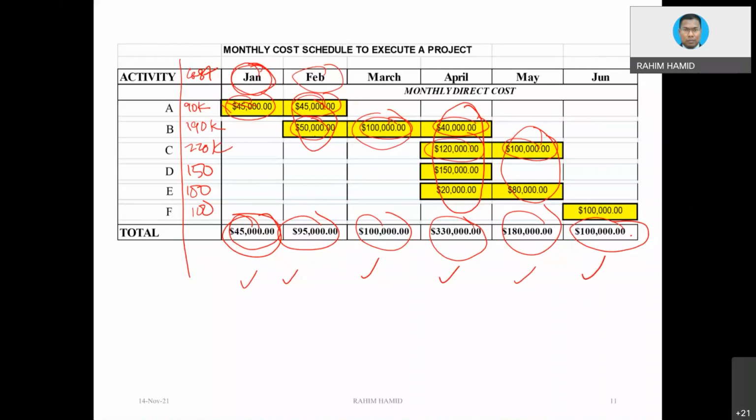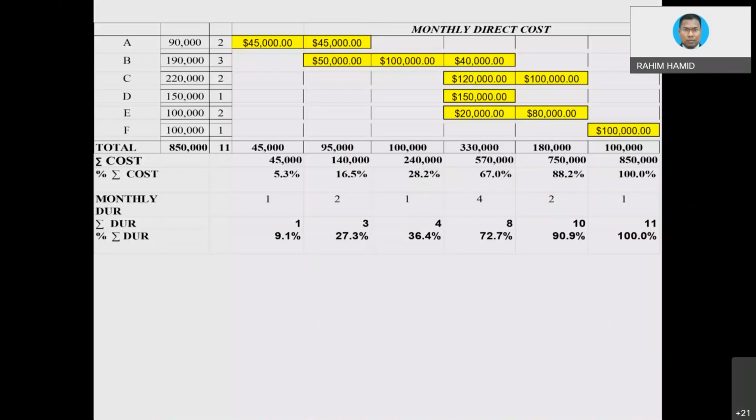So that's why the S-curve that we mentioned is going to be used as well in project monitoring, because in the construction industry worldwide, the S-curve is widely used as an indicator to tell people how much financially you have progressed or physically you have progressed. Okay, now let's go into a little bit more detail based on the same example. Let's say our cost is written there, and each activity is stated there.